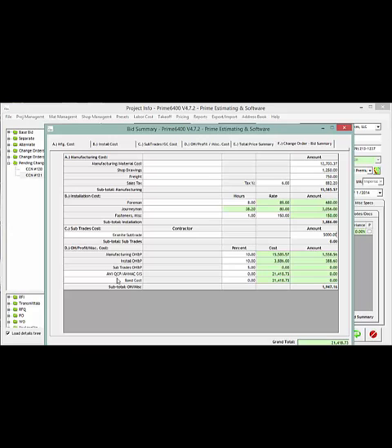If you do have certification requirements by the woodworking associations, you can come down here and add in that fee that's required for that. And likewise, if the documents call for bonding, you can add that bond amount in there to return your final amount down below here for that particular change order. And that's all affected under tab F. The base bid is usually taken care of with tabs A through D and summarized on E. But in this case, we jump right into F to be able to complete the format here that's typically required to submit your estimate back for changes.